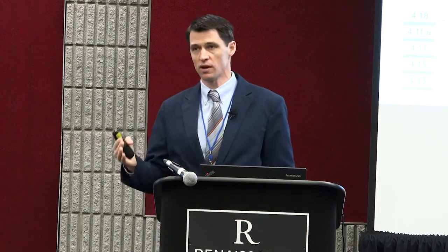When someone comes up and says, why can't we do project 2.16 tomorrow? Well, building 2 isn't going to be ready for project 1.6 because we need to do projects X and Y, and that can't start until XYZ, driven by long leads or driven by design. So we've taken this tool, and it helps us set priorities for how we're going to start diving deeper into our schedule development process.